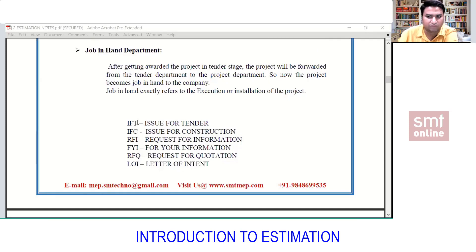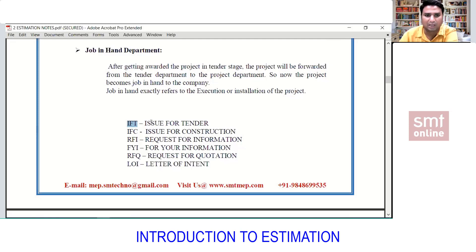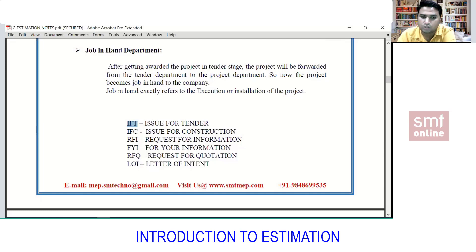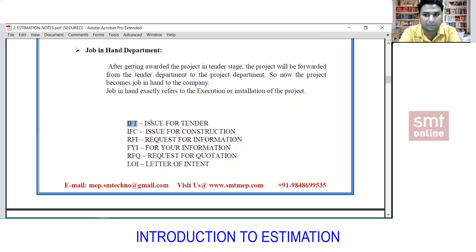There are some abbreviations commonly seen on the estimation side. IFT stands for Issued for Tender. If you see this on a drawing, the project is in the tender stage — a fresh project. IFC stands for Issued for Construction, meaning work can proceed with the construction or execution. If I am working in job-in-hand and see a new project, I forward it to the tender department saying it's a new project currently in the tender stage.